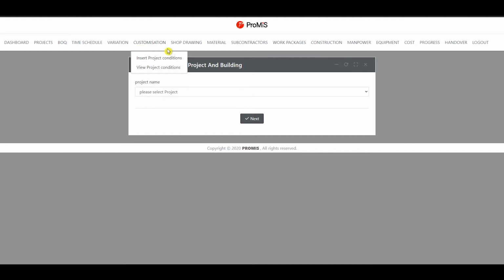Therefore, the data entry for BOQ is the first compulsory exercise for newly inserted projects. On the other hand, it is extremely important to mention that the BOQ items should be the same as the time schedule items. Sometimes it may be necessary to break down some BOQ items, as it will be required by the planning engineer, so as to fulfill the construction time schedule requirements. After keeping the above notes in mind, and after the necessary coordination with the planning department, the customer will be ready to access and use the BOQ chapter.